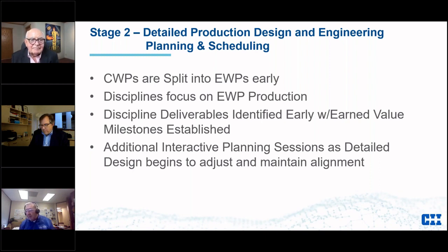What we've done in our big room in the past is we took our interactive planning with all the stickies and everything, and we lock them down, and then we'll actually put those up on the wall, and then you can walk in there. Okay, it's July. Here's what we said we were going to do. How are we doing? In some cases we have to go in and start rearranging some stickies and say, look, we need plan B. Plan A isn't working like we thought it was for one reason or another. So I'd like to adopt more of the big room approach.